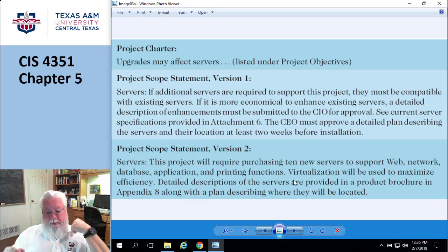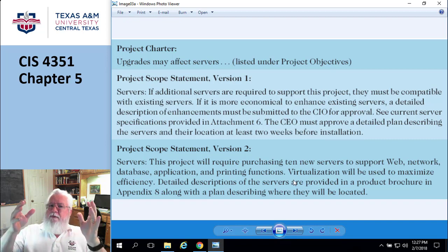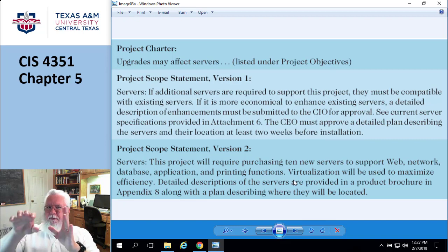That's one way. The other is by phase. Okay, phase 1 of the project is going to do this, and phase 2 we're going to do that, and phase 3. That makes kind of sense. And the other one is by those process control groups, where you're initiating and executing, and the process control groups. We've been talking about those forever.